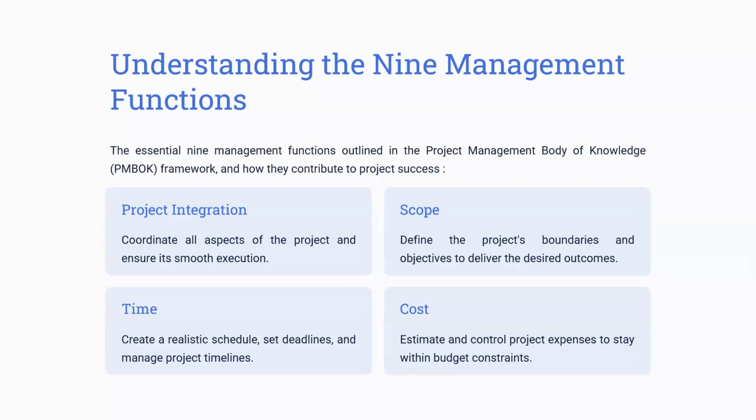The scope of the project has to be defined very clearly to all the parties in the project. So who are all the parties? The project manager, the team members, the management who are going to approve the project, the stakeholders, and sometimes even a few customers, a segment of the customers, can be made to get involved in the project. So the scope has to be clearly defined, and it has to be communicated to all these parties, and there should be boundaries for the scope.